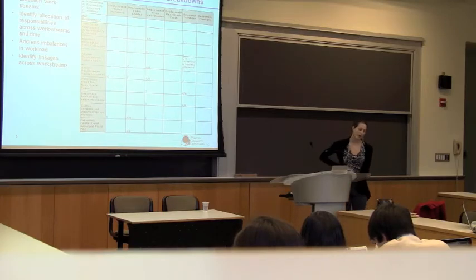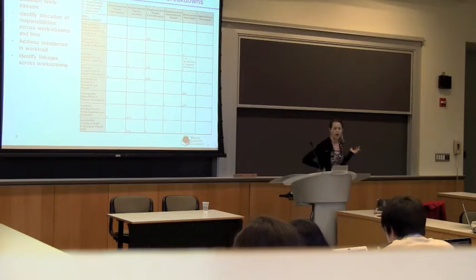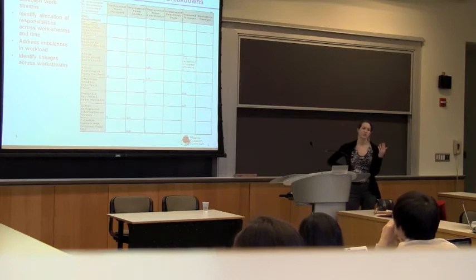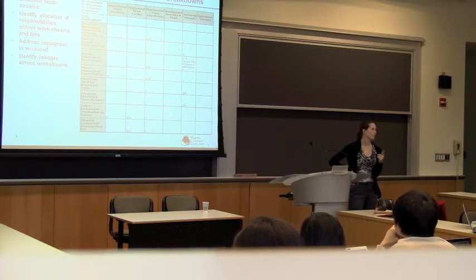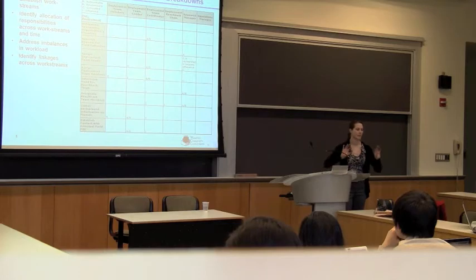So when you think about, okay, here are all the activities or the actions that we need to take in order to meet our objective on your given project, one of the things that you need to think of is how to structure your team and how to divide out the work among your team members. And typically, this is consulting jargon, but we think of those as work streams. So you have one work stream addressing one set of activities, and another work stream that can act more or less independently, working on another set of activities. And the ability to divide those out allows your team to collaborate with one another, but also have a certain amount of autonomy, so that you don't all need to be talking every minute of the day, but you have just a clear work breakdown structure.